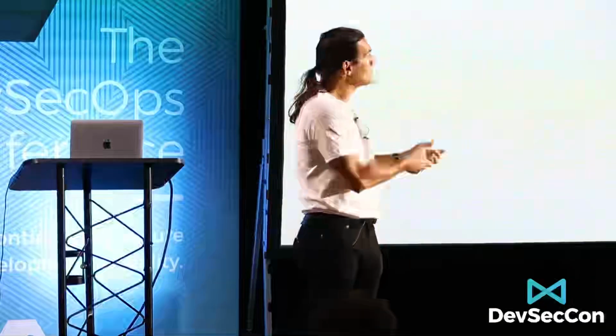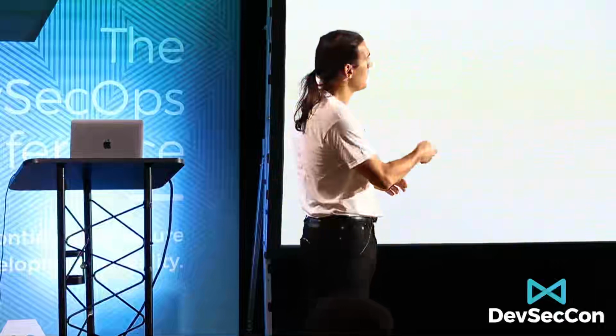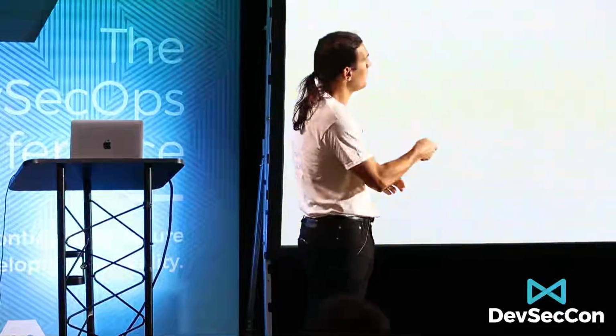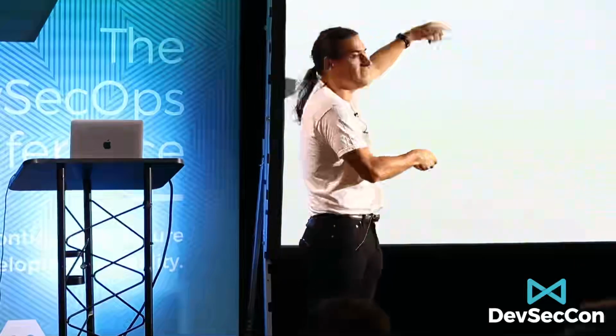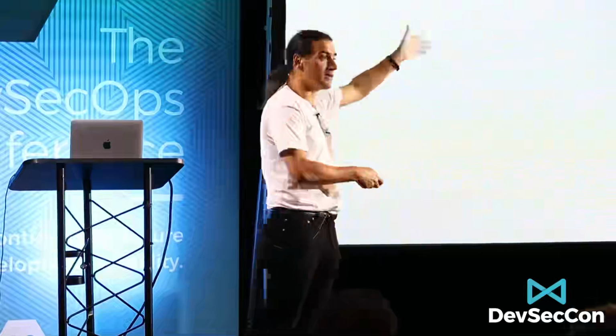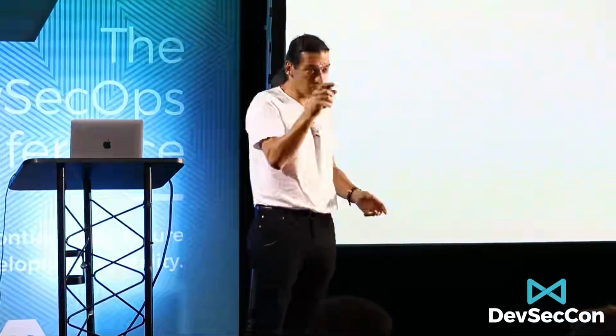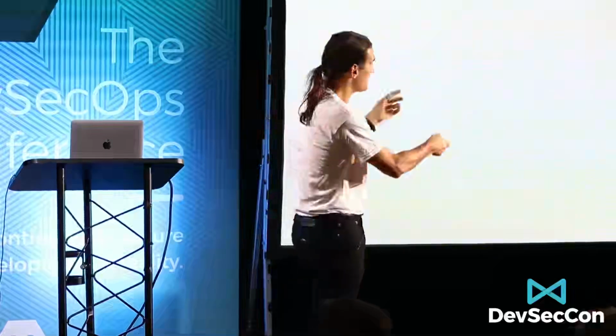And then we have a dedicated team, which I'll talk about in a second, and they do it straight away. They will create the epic that maps the whole thing. And then we start to map all the incident tasks. These are the ones that will create 20, 30, 40 per event. And again, the more the better, because the more granular you go with the questions, the more objective and the more focused you are, and the easier to delegate. And then we have our hyperlinked version of risks.